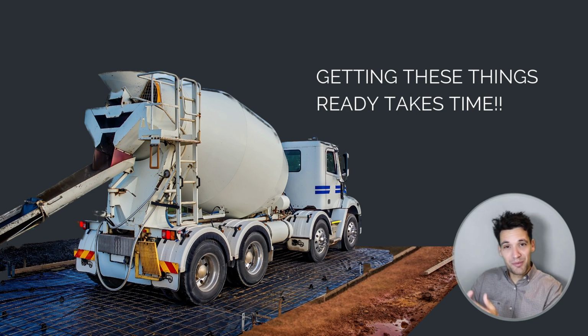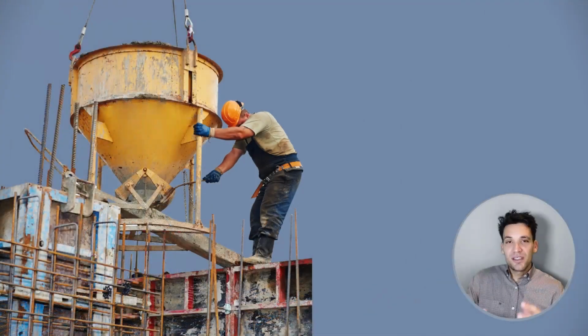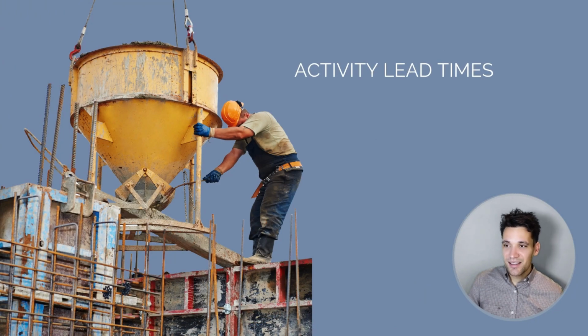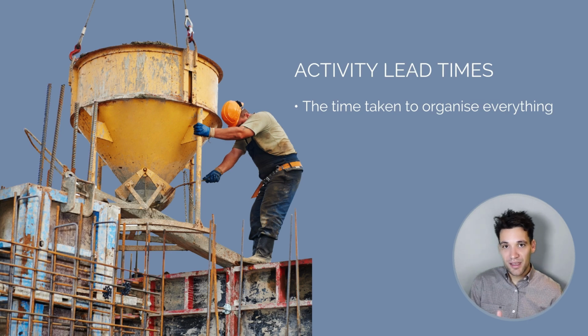Depending on the type of project, it might be really quick. If it's a more complicated project where you've got longer lead times for materials, you might have to be looking 3 or 4 months ahead to ensure things stay on track. So this is the idea of activity lead time. Activity lead times are basically just the time it takes to organize everything before we do the work.